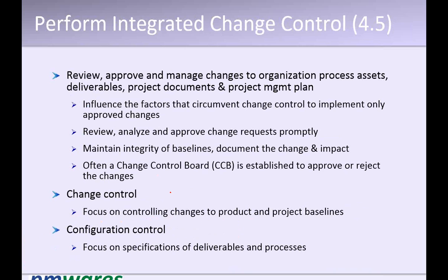To prevent such kind of things, any change, any requirement coming to you which is not originally defined in the scope, must come through the change control process. So you must define a change control process. The idea of change control process goes like this. When you get a change, you first qualify it. Means, is this change really required or not? First you qualify it.